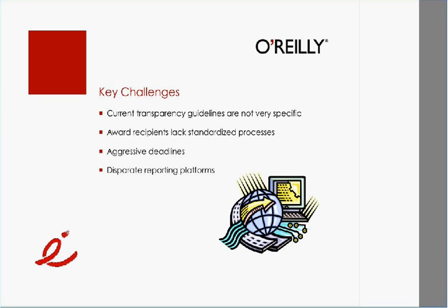One person said, well, if it's 30% behind schedule, that's late. And then the other person said, well, if it's 10 days behind, that's late. So there's no standard in place. And what a lot of organizations think right now is that all they need is some kind of technological platform to provide reporting. But to me, that's the easiest part. Technology is the easiest part.